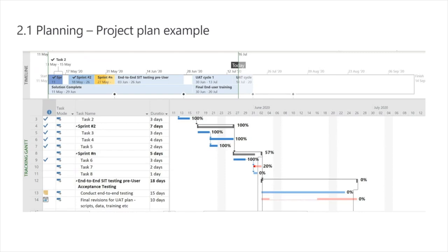If your methodology is entirely agile and you don't have a project plan, you're doing prioritized backlogs, then again, derive a critical path from that prioritized backlog where you can see what are the critical elements that need to get delivered on time.